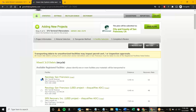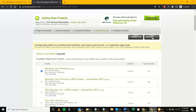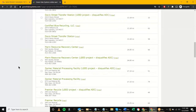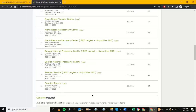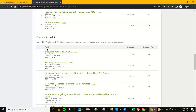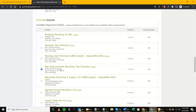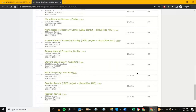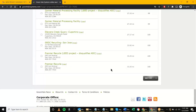Here's the list of all the C&D recyclers. There are some that say 'Marine Resource Recovery' and 'Marine Resource Recovery — LEED Project.' For LEED projects, the LEED option excludes or disqualifies the ADC, which results in a lower diversion rate. Scrolling down to the concrete, if the stuff is going to a concrete crusher like Bay Area Concrete Recycling in San Francisco, we have the address and phone number. The facilities are listed by proximity to the project site address — so 7 miles away versus further, and at the very bottom something like Premier which is in San Jose, about 35 miles away, has a bigger carbon footprint impact.